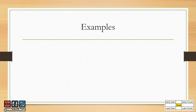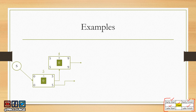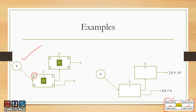Before we look at examples, let me remind you how activities are represented in a network diagram. You have four numbers in the four corners representing early start, late start, early finish, and late finish, and there is a number in the middle which represents float. In the first method, we begin on day zero, so the early start for the first activity is zero. This is the first method of calculating the network diagram values.